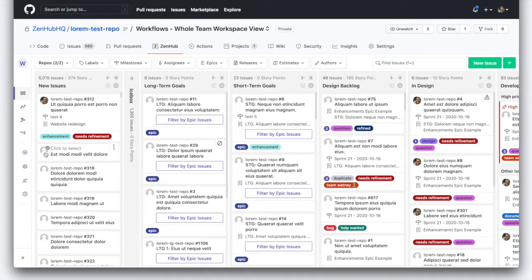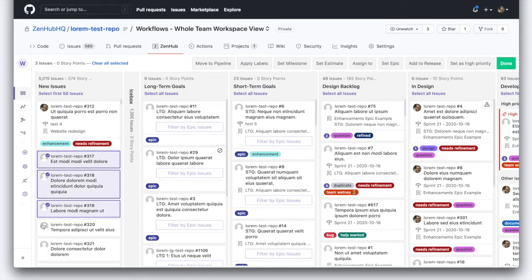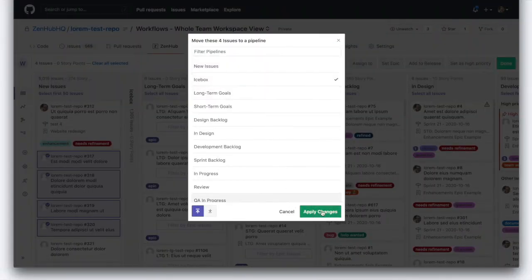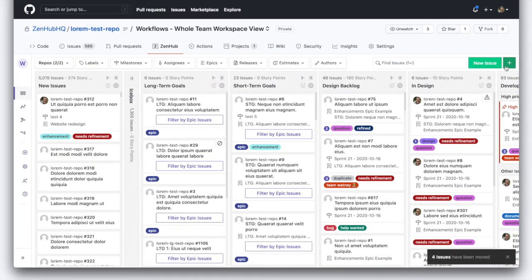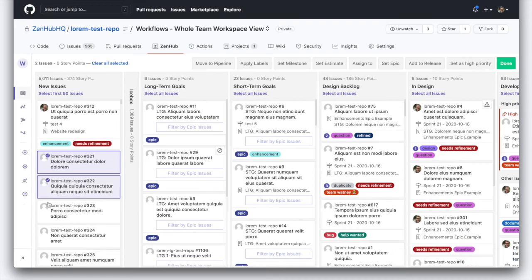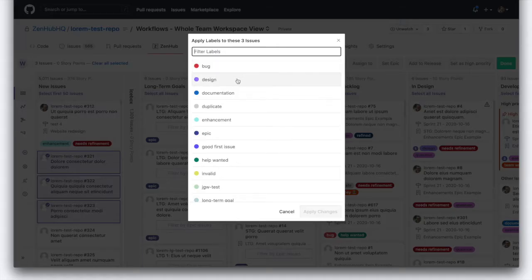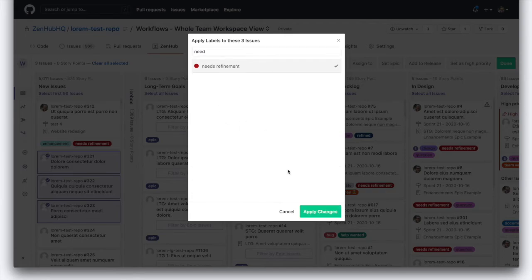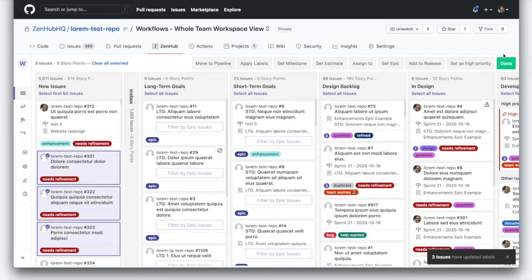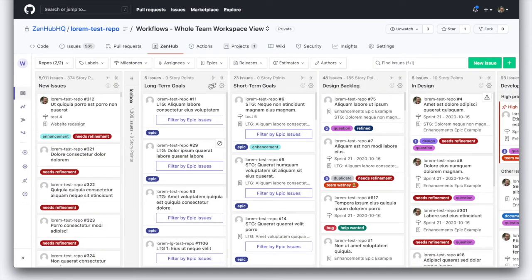Let's say you need to do some bulk moving of issues. You and your team have decided you're going to icebox these — you can click to select multiple cards, click the move to pipeline button, drop these in the icebox and click done. You can also select issues and apply labels — let's say these need refinement — and the labels get applied. You can also assign issues to people, assign them to a milestone so that when you're doing sprint planning, you can select five or ten issues at a time, add them to a milestone, and do your sprint planning really quickly.